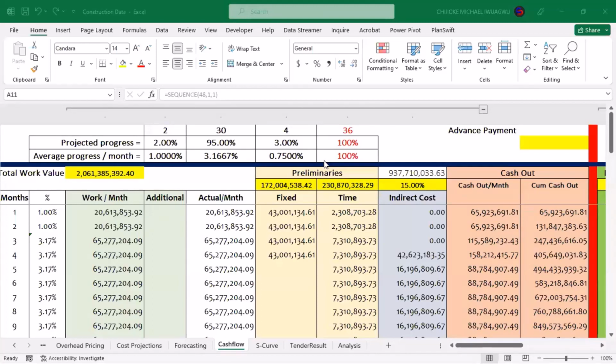All right, sir, what do we use amortization for, and where is it applicable? Amortization is the process that you use in recovering the money that you have given out. Amortization is like when a client gives you advance payments. The process of reclaiming that money back one after the other, 1 month or interval, or based on the defined deduction rates as possible, that is called amortization. You use it only when you are recovering money that you have given, an advance payment that you have given to a contractor ahead of time to help him mobilize on site on the project.